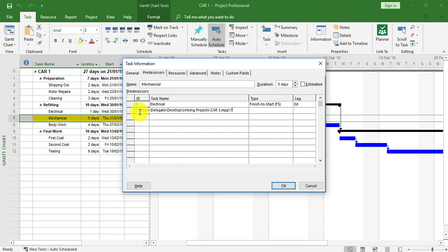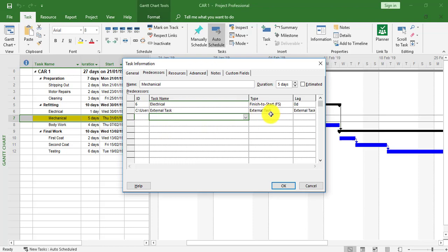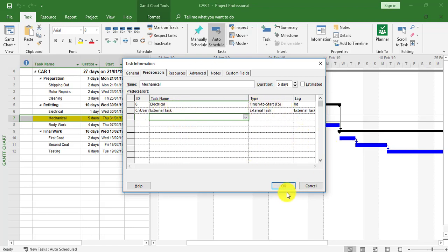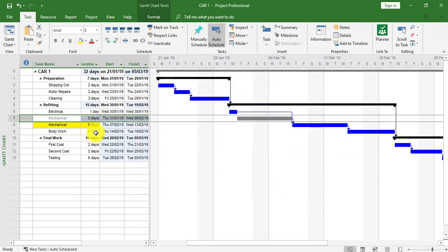If I click one line down, it now tells me I'm forming an external task link, so it knows I'm going to another project. If I click OK, I can now see a gray task within Car 1.